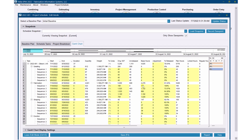Basically it took those hours from the estimate, applied them to the actual material in production control, and I have essentially re-estimated hours here. Our original estimated hours for sequence one was 150 hours; the base hours says 165 hours, which means our plan is going to be 165 hours — that's what will be used on the production schedule for sequence one, since it's more than the original estimate.